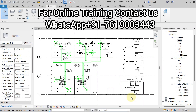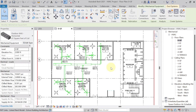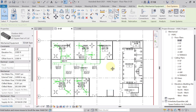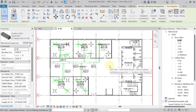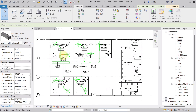Welcome back to this lecture. Here we will discuss how to prepare a BOQ — Bill of Quantity — for supply air duct, return air duct, and duct fittings. To prepare the BOQ for supply air duct, come to the Analyze tab, where I have already run the supply duct.